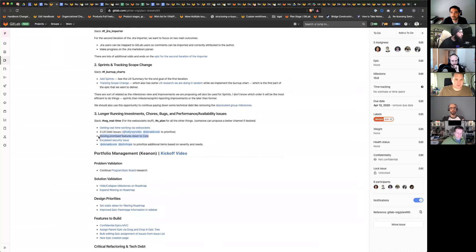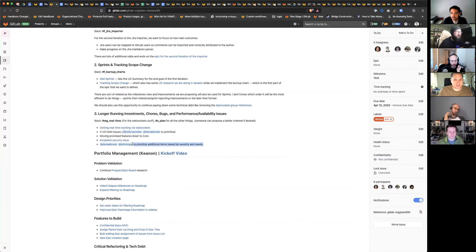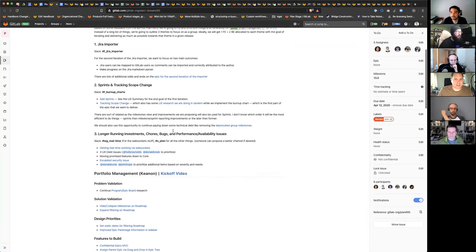We also need to move some promise features down to core. There's an escalated security issue, and Donald, John, whatever else you guys feel like we need to target from bugs, SLA, that sort of thing — that is going to be the third basic theme. And I think we'll probably have a theme like this every release, and then we'll try to have kind of two main feature themes. That way, eventually we can get to doing 50 to 60% feature development and 40 to 50% refactoring and paying on technical debt until we get that back in line. That's my update there.